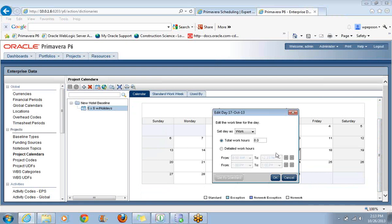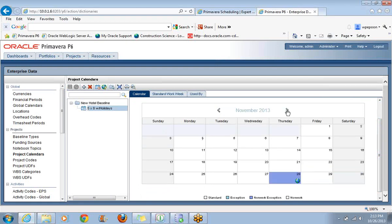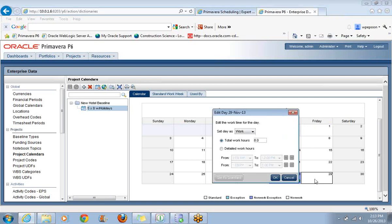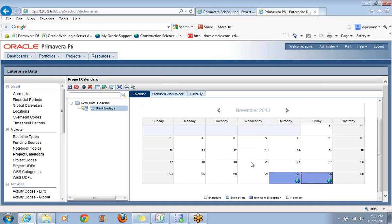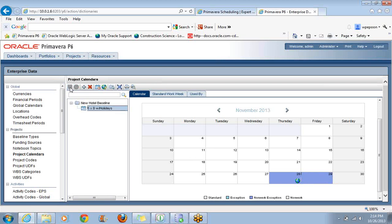Just like before, if we want to create a holiday, let me just skip out to Thanksgiving. Let's say we want the day after Thanksgiving to be a holiday. You'll notice that Thanksgiving was already inherited from the calendar that I copied, from that global calendar. So I click on the next day and I make it non-work. Click OK, and it becomes a holiday, or an exception as Primavera would call it, because these can be a lot more than just holidays. Notice though, I once more have to save my change. Did you notice that for a moment it was even calling it a global type of exception? It was showing that globe, but when I saved it, it went away.